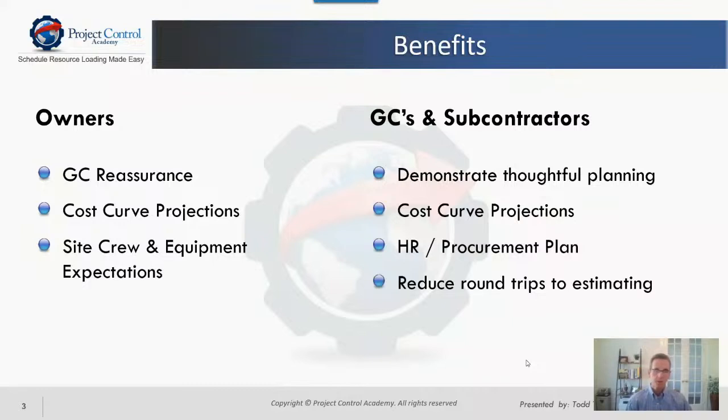So we recently worked with a client that integrated Innate Estimate with Oracle Primavera Cloud, and one of their main objectives was, as they were fine tuning the budget before day zero or go live, that they wanted to be able to change durations within the schedule, and if they're cost loaded, if the resources and the rates are loaded, essentially as soon as they do that, the cost adjusts. So they didn't have to go back and forth to the estimating system to get those cost updates, as well as scenarios too.